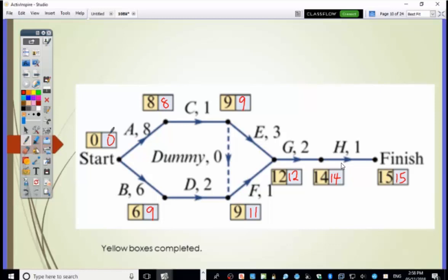It's going to be 9 minus... It's going to be the smaller number again. 8 minus 8, or is it 9 minus 6? It's 8 minus 8. Now, from the pairs of numbers, float time is in here. That's got a float of 2. This has got a float of 3. There's the difference between those two numbers. So that's how you get floats off the table.